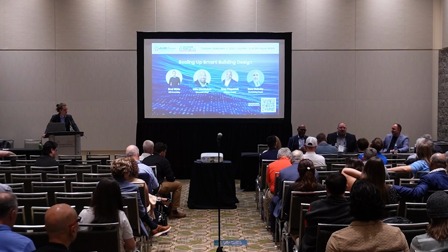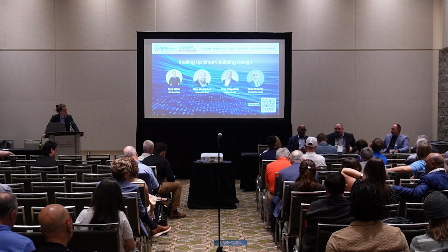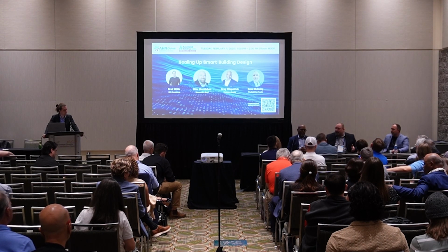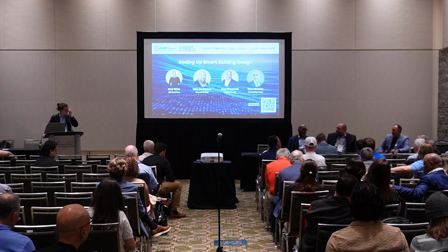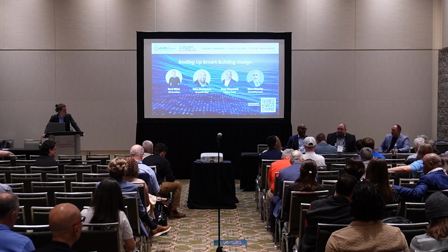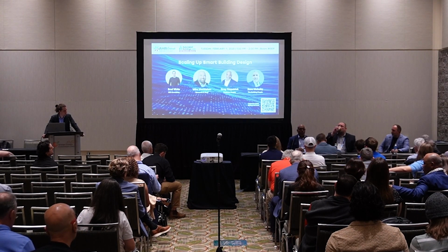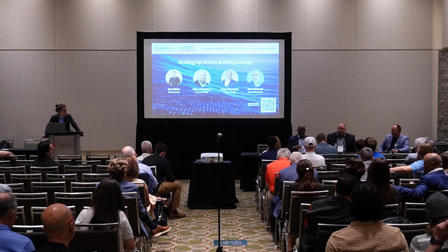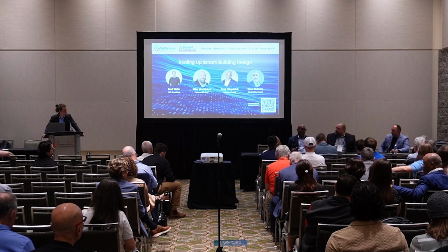And so that's where the commissioning process comes over and oversees all of that and buttons that up. But if it starts at the end of the project, it becomes an almost impossible job. It's not like the never-ending story, right? Yeah. The issue with access is a lot of times the requirements for access are buried in the specification for the specific pieces of equipment. And that's why it's important for the commissioning agent to know where it is, to make sure he's doing his walkthroughs and that all that equipment is accessible.